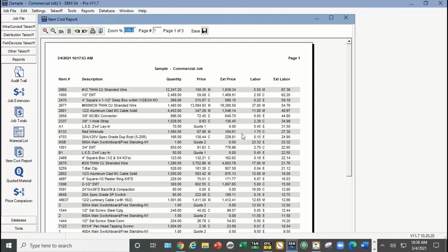And if you need to go through the math on that, I can show you how it works. It's a reciprocal calculation if you need to do gross profit versus markup. But just keep that in mind. A 50% markup is not 50% gross profit. A 50% markup is a 33% gross profit.